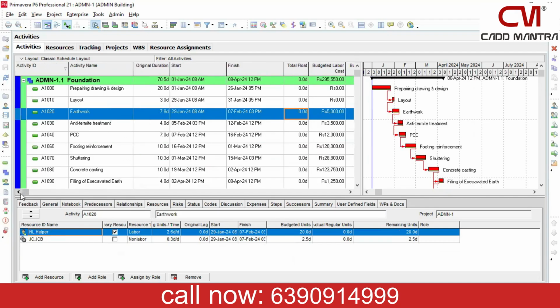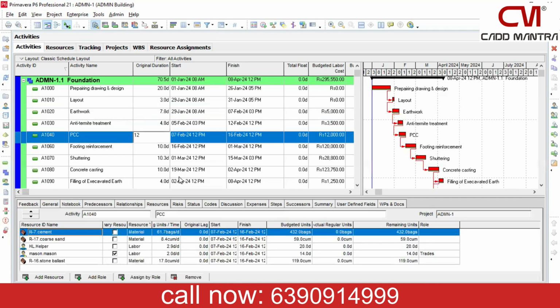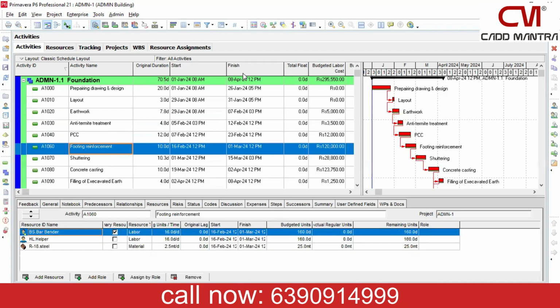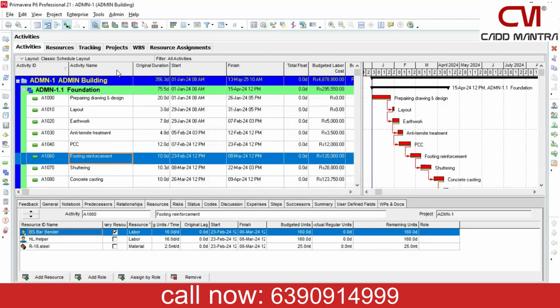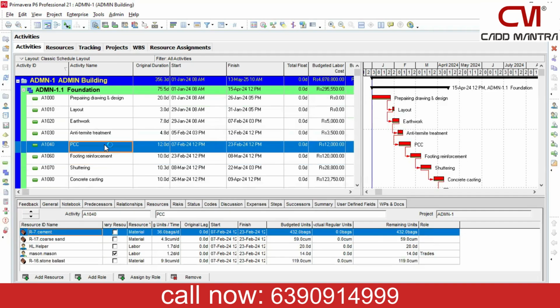So we are going to use the CPM methods, and whenever you are making any changes, any logical sequencing changes, automatically the software will be calculating your new critical path as well as the total duration of your project. We use this whenever we feel that we have to make some changes, or we're just going to change the activities duration, activity sequencing. It is going to tell us the longest path. What is the critical path? Because this is what it automatically highlights with these red color bars.